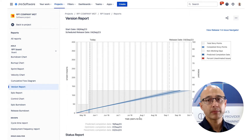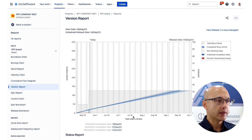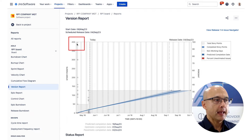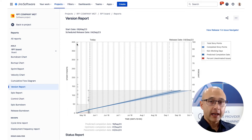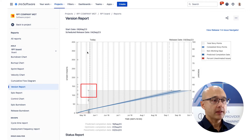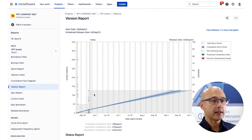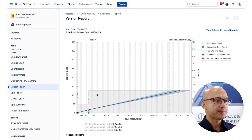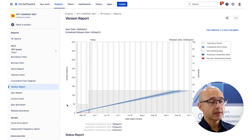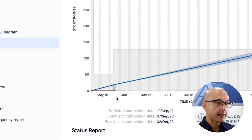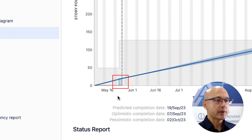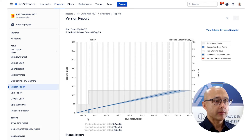You can see the total number of story points in the release presented as light gray. On my report it started off as 400 points — remember my entire product backlog was 400 points, but I dropped it down to 127 to cover just A through to O. Completed story points are shown in blue on the chart. You can see a little bit of blue here because my team has only just started their first sprint. I'll give you another example in a minute where it's a little more visible.